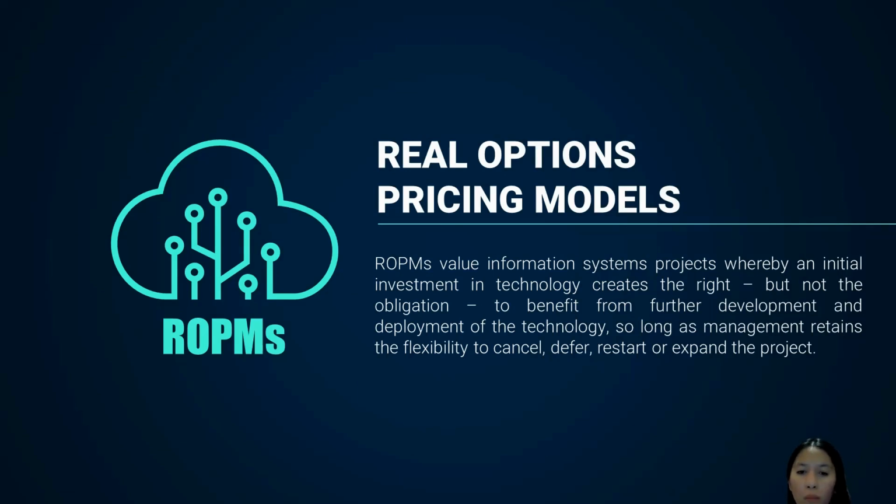As we all know, investing in systems is more likely to be of high value, and companies don't know if the investment will be profitable in the future, so it is very risky. With the help of ROPMs, the company can reduce or minimize the amount to be spent by availing first of tiny pilot projects or a prototype of a system, so they can test the waters before making a larger investment in an IT project and learn more about the risk involved.